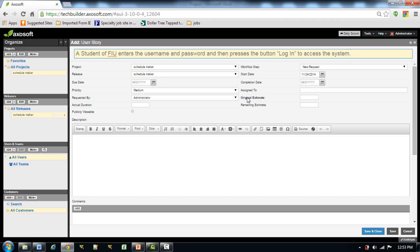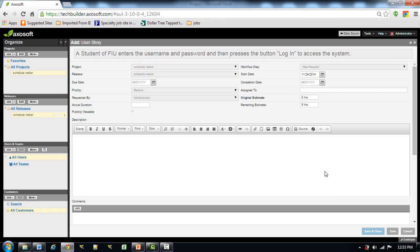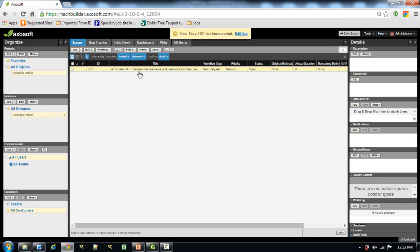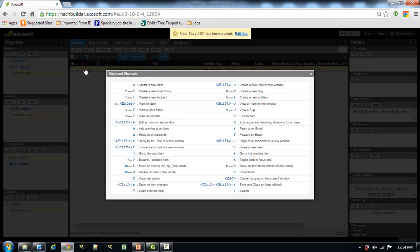In Accessoft OnTime, time is taken as a measure in calculating and forecasting the project completion, which we will see through burn down charts. So it is important to give the original estimate of this user story — how much time will it take to develop this user story. Let's say eight hours for this one, then we'll save. We have created a user story. You can also create a user story using keyboard shortcuts: press C to create a new item, and press N and S to create a new sub-item.